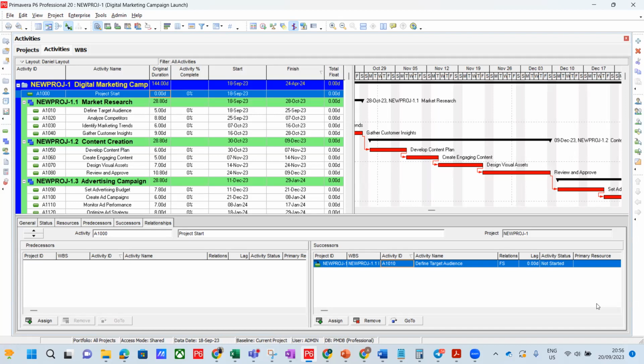So we charge you £100 per hour. That's £900 because you are renting it for, or they might say, well, is that per hour? That's what we charge. If you want to rent it over 24 hours, we're going to charge you 2,400 because we charge £100 an hour. And if you're going to have my man work on your job for 8 hours, we'll charge £200 per hour, so you're going to pay us 1,600. So we charge based on man hour.